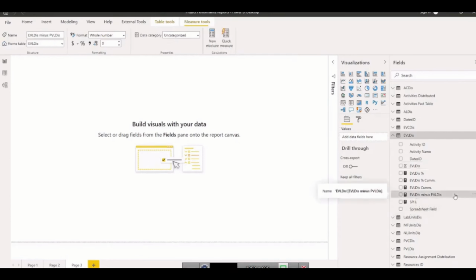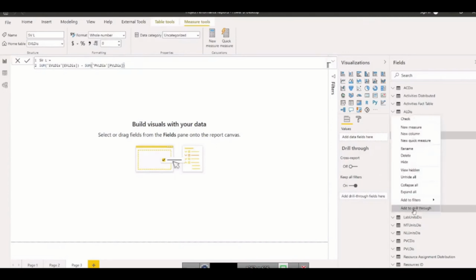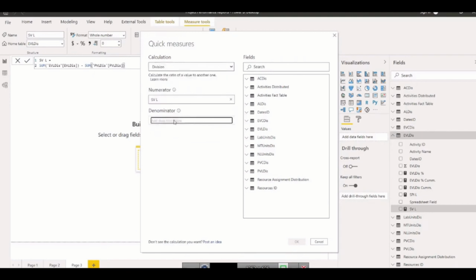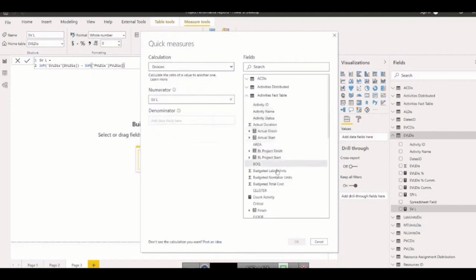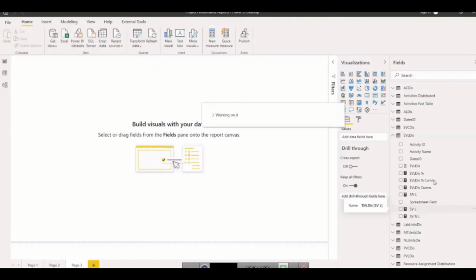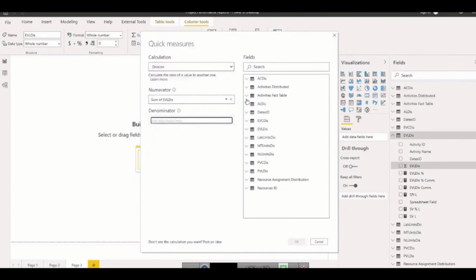Yes, it is here. So name it schedule variance and labor. Percentage of this is coming from division of this by the total labor. So the total labor is this of the project. Schedule variance percent labor. CPI of labor, dividing this by actual labor.